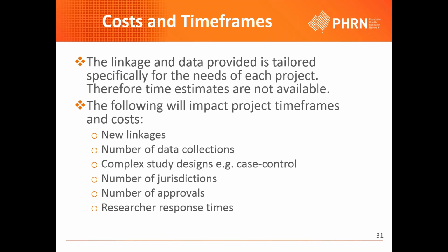There are also a number of other things that impact on both the time and cost of linked data projects. The main one being complexity. We sort of look and say, well, the more complex the project, the longer it could possibly take to do, and the more expensive it could be. So if your project requires new linkages or a huge number of data sets, or it's got a complex design where it may be case control design, and the number of approvals that are required.